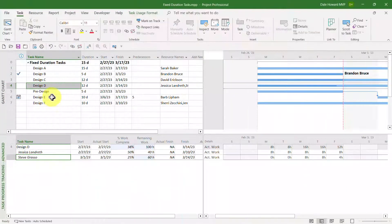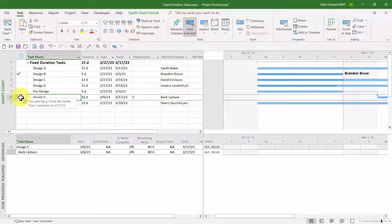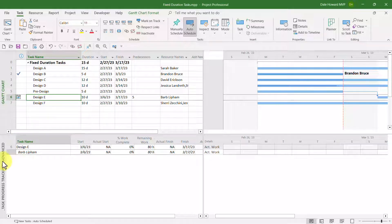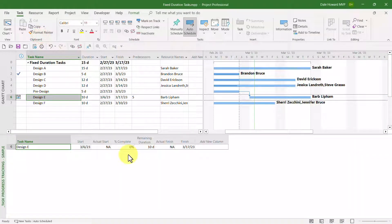The next scenario is an unusual one. This is when you have an early actual start date on a fixed duration task that includes a finish no earlier than constraint. If I float my mouse pointer over the indicator for this task, you can see it has a finish no earlier than constraint of March 17th — meaning the task cannot finish any earlier than March 17th. I'll switch back to the simple method of task progress tracking.